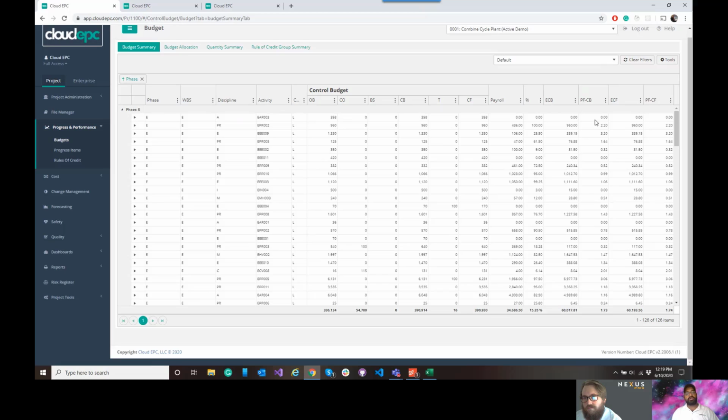And just like in cost, we have our current budget and our current forecast. If we were to look at it from a client perspective, and if the contract required, I'll clarify that, to state your performance factor, you would be able to run a current budget performance factor. Let's just say you had estimated the extra 10 linear foot of pipe in that example I gave earlier, where you originally had 100 and now you have 110. We could add those additional hours into the current forecast and run a current forecast PF.